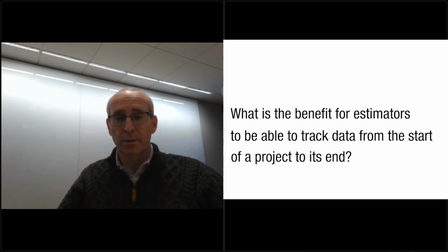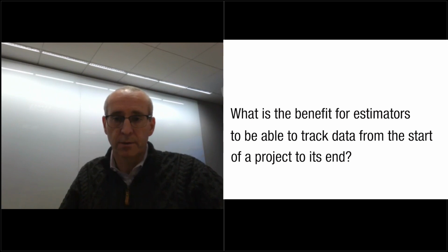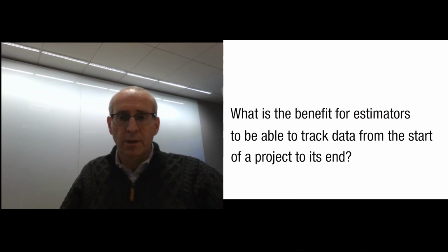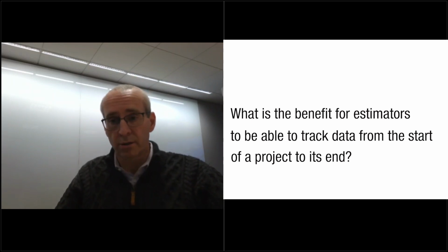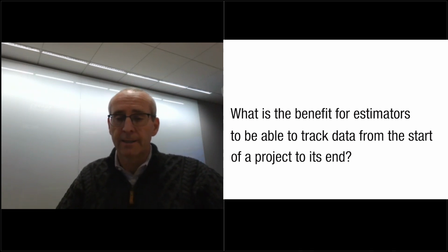So part of this is the ability to provide a simple and easy to use tool that enables them to get done what they do today, but behind the scenes, capturing all of that information in a way that you can have pre-construction data lifecycle. You can very easily look at the variances between iterations. You can point to why specific things changed. And then across projects, you can look at, say, the last 3 projects that you did for historical purposes as one example. But you can also do things like compare line item unit prices, or compare fee structures when you're working, say, with one owner versus another owner, or one building type versus another building type.